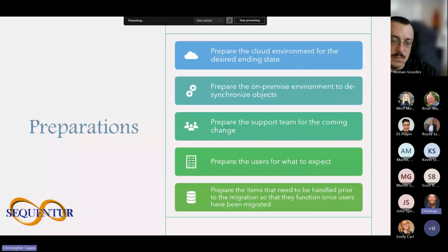We found, because we had so many moving parts, I mean, we had Active Directory, Okta, Intune, Citrix, just a host of moving parts inside the organization, that it was best to just handle them on an individual basis and make sure everybody was good to go. And really, the time was probably about the same. If we had flipped the switch and everything broke, we would have spent far more hours trying to get migrated. Right.